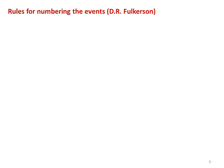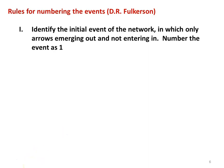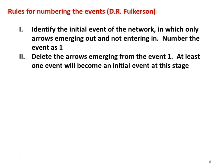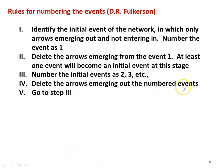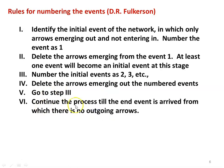Rules for numbering the events are given by D.R. Fulkerson. First, identify the initial event in the network in which only arrows emerge, not enter. Number it as 1 and delete the arrows emerging from event 1. At least one new event will then become the initial event. Number subsequent events as 2, 3, etc., then delete the arrows emerging from the numbered event. Continue this process until the final event is reached, from which there is no outgoing arrow.